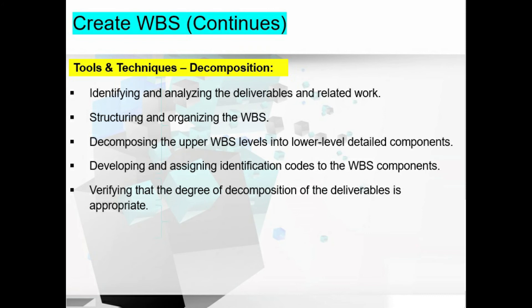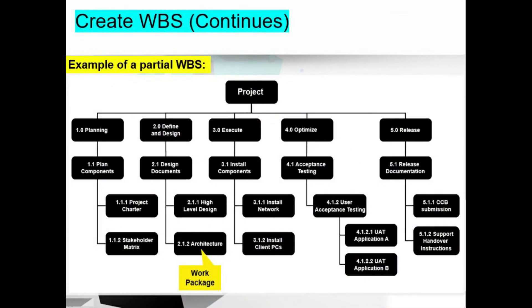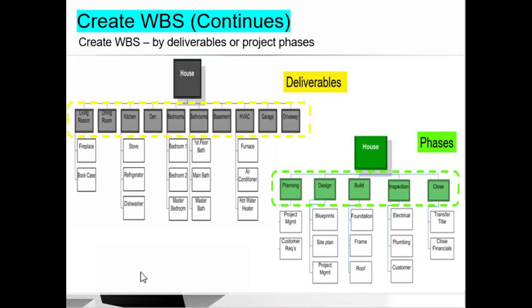Decomposition may not be possible for a deliverable that will be accomplished far into the future. The 100% rule states that the total work at the lowest level should roll up to the higher level so that nothing is left off and no extra work is performed — everything is covered from lower to upper levels. A partial WBS example shows a project divided into manageable sections: planning, defining, design, execute, optimize, and release — each further divided into activities until the work package level is reached. WBS can also be created by deliverables or project phases.